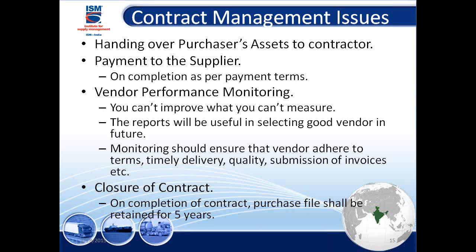And then the next question is payment to the supplier. Normally I would say that, as per the payment term, it should be on completion. But for a big project, I can also understand that if the project is 4 or 5 years, the poor guy is not going to spend money for 5 years and then wait for 1 year to get the payments. So they expect it on a milestone basis.